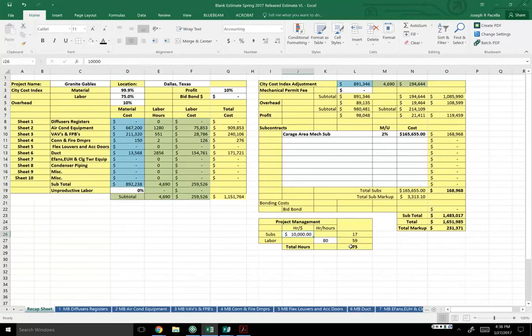In mechanical contracting, there will be an assistant project engineer, then there could be an assistant project manager, and then a project manager. On a job this size, you'd have a project manager and at least 2 project engineers probably on this project. Not on this one here, but by the time you get everything else in here, it's a relatively quick job that went in. A lot of coordination had to happen. So I'm going to put this back to 8%, and you'll see how this went from 59 to 63 hours here.